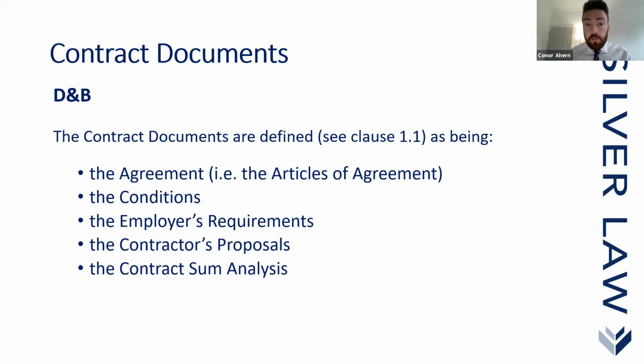And I remember when I was working with a contractor, basically as a QS, I'd always try and get my schedule of clarifications in quite high up in this hierarchy, particularly if there was a follow-on hierarchy clause. Because that's where you basically want to get any of the assumptions or any clarifications that need to be made in relation to the contractor's bid. That's where you'd really want to get them. So yeah, this is a standard list, but obviously, it's always good, particularly if you are the contractor, to include your schedule of clarifications within this list.